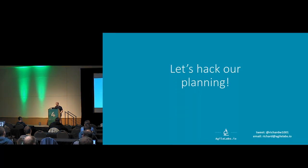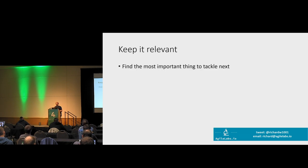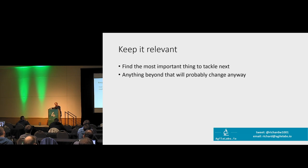The third main ceremony in Scrum is planning and grooming, and this one really sets the pace of how the team works. The biggest thing a lot of teams do is have the infinite backlog — hundreds of items that will go for months, maybe years, some of which will never happen. Stop it. Try and focus on what you're going to do next — what's the most important thing you can do right now? Because anything beyond that will probably change anyway. You should be changing your plan in flight — expect it. Don't spend time talking about the distant future.